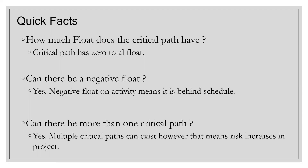Can there be a negative float on a critical path? We talked about no positive float — but can there be a negative buffer? A negative float can exist. A negative float on any activity means that the activity is behind schedule. It's a tricky question; I personally haven't seen exam questions with negative float, but always know that a negative float is possible and means the activity is behind schedule. Positive float is not possible on a critical path at all.